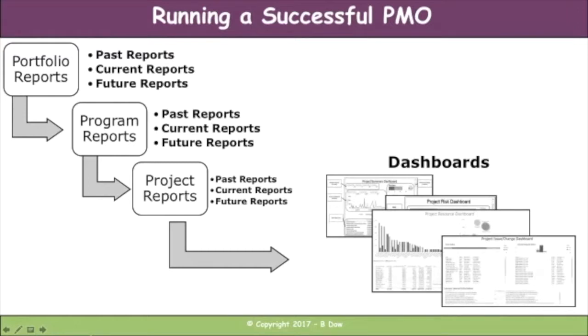Don't rush to dashboards, although they are getting a lot easier with Power BI and Tableau and all the various great dashboarding reporting out there. But you're going to want to get the manual reports going first, and then again move to the dashboards later. So get it working and then move to the dashboards. But there's just a ton of different types of reports you can get.